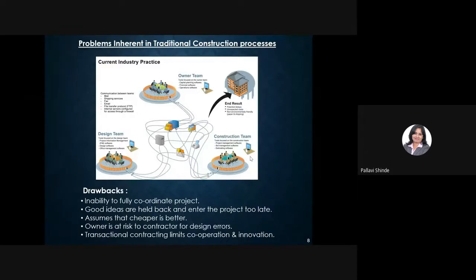And then the report is generated on the clash detection work, where we are able to witness all the clashes, and the same is resolved in the model. Then the drawings are generated. Okay, so this is the methodology which is used to resolve most of the clashes in the meeting room, then create the GFC which are clash free.